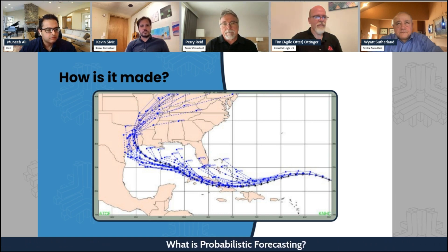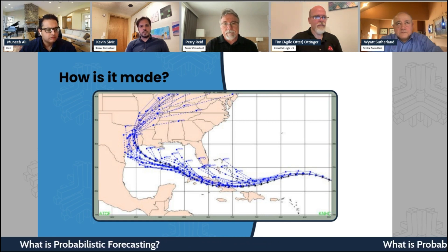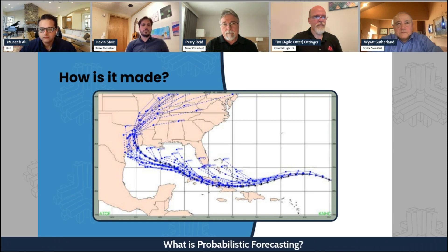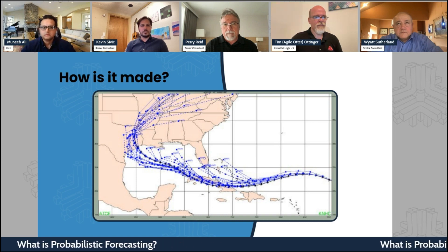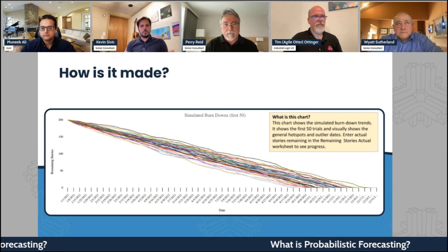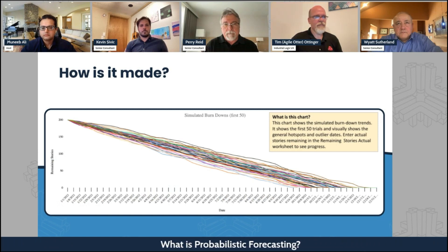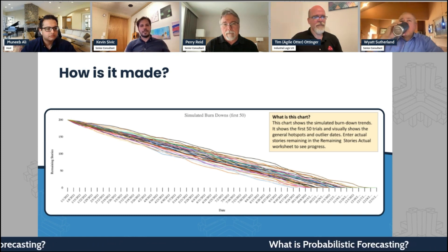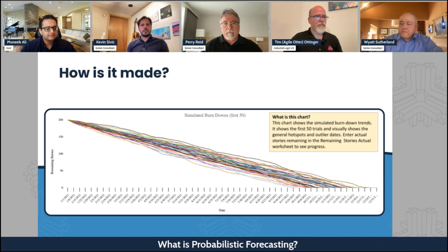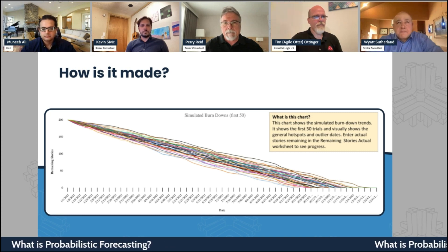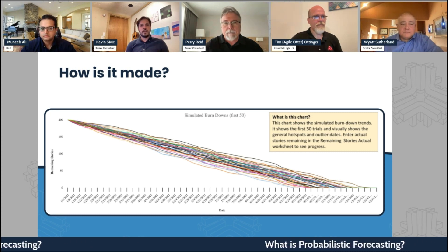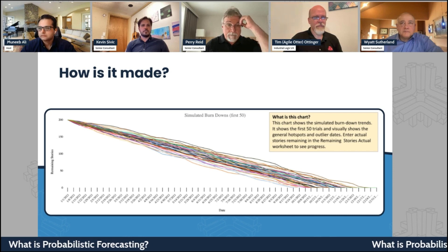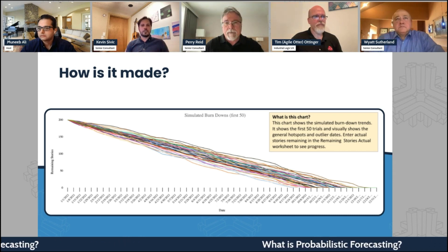They just update the forecast really frequently. We do something pretty similar to this for forecasting knowledge work — the type of work we do in building products — and we can generate pretty much exactly this chart. We're generating a spaghetti chart simulating burndowns. This is what a Monte Carlo forecast is: we simulate based on our historical data on how many things we've gotten done in the past, and simulate how many things we think we might get done in the future. We just pick a line — if we want 85% confidence, we say 85% of these simulations ended on or before this date. That's our forecast. That, in a nutshell, is what Monte Carlo forecasting really is.